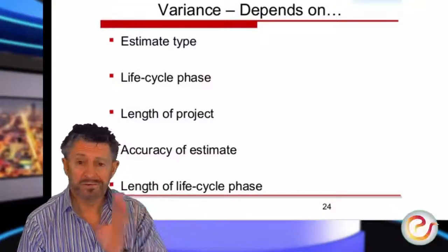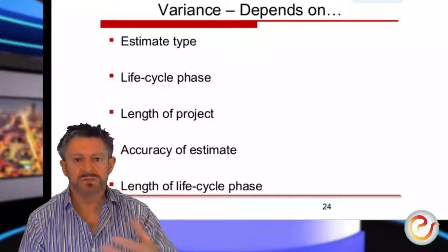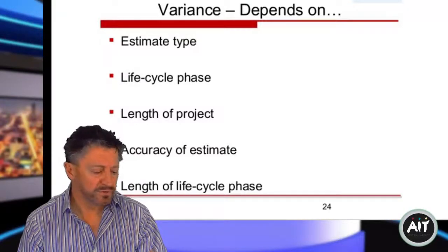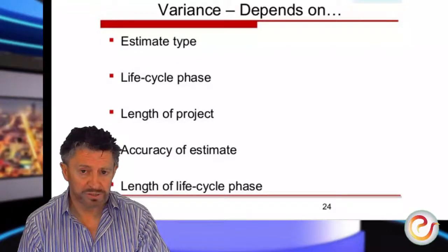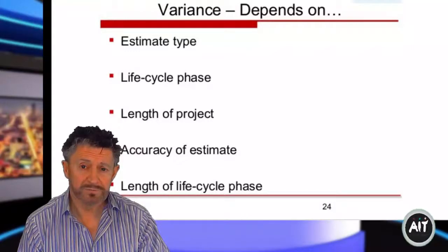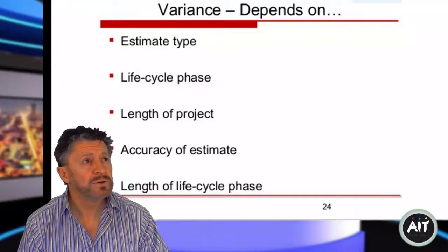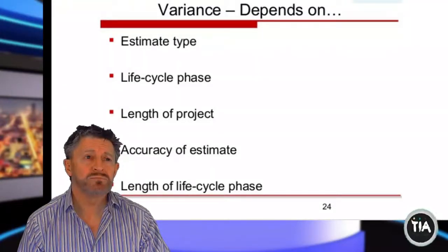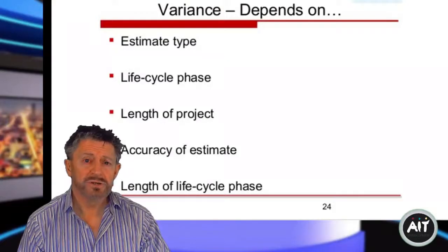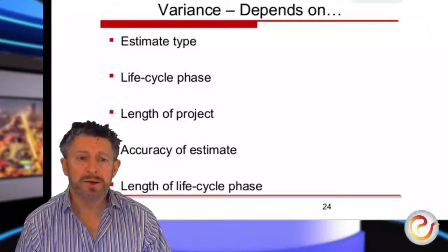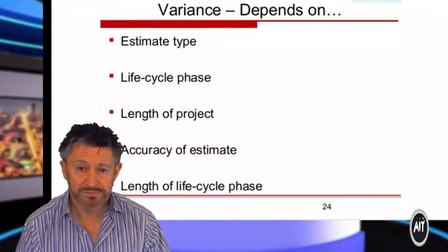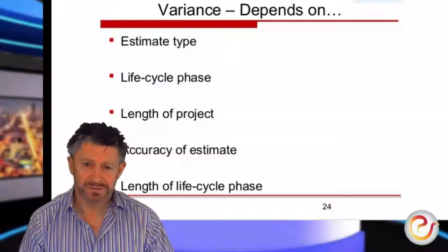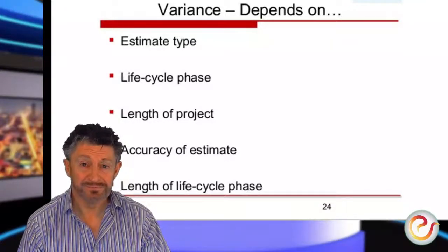Remember, I was saying if it's only a matter of weeks, you wouldn't do a lot of this. If it's months or years, most certainly do it, because I can cite one of our most famous projects currently in Ireland, our Children's Hospital. What originally, from memory, was supposed to cost 600 million euros is now going to cost probably somewhere in the region of 2.5 billion euros. Okay, which is pushing on 4 times the original estimate cost.